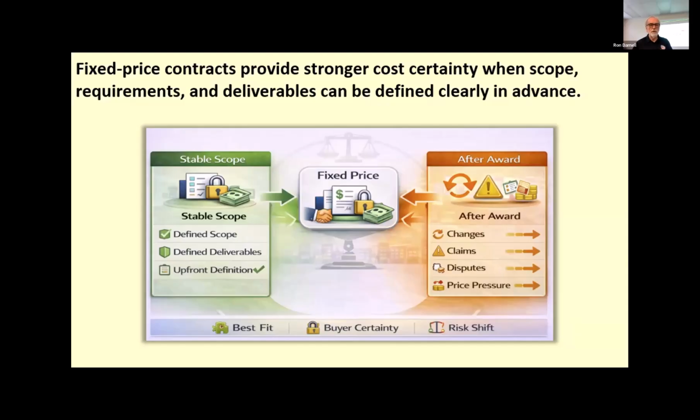That makes the contract attractive when cost predictability is important and the project team wants a stronger baseline for managing external work. Usually in fixed contracts, you have milestones where you make payments to people. You can just kind of say, this is what we're expecting on a certain date, and you don't have to do a lot of monitoring other than just making sure they're on track, because all of the financial risk is on the vendor because it's a fixed price. They get paid the same money no matter how much it costs them to do it. Now, I have seen fixed price contracts where you build in exceptions, but still at the basic level, it's a fixed price. The main advantage of a fixed price arrangement or contract is price certainty for the buyer, for the project.